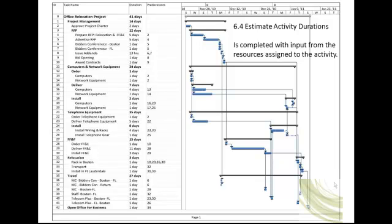The RFI, or request for information, is one tool a project manager can employ to gather information on vendors' availability, pricing, and activity duration. An internet search and several telephone calls could also produce the same results. Notice that the timeline of the project has expanded through each process.